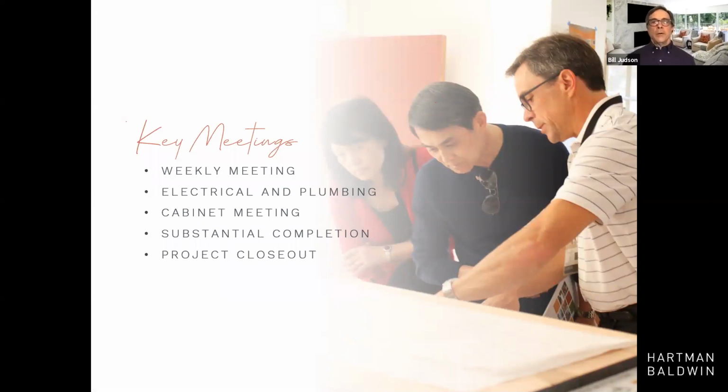More than ever, now is the time that we need to be communicating well, because part of your house may be gone and we're in and out of there every day. So we make sure that we have a weekly meeting where every week we'll meet and we'll talk about what happened last week, what's coming up next week.